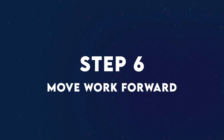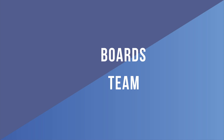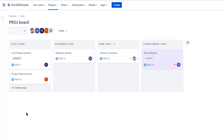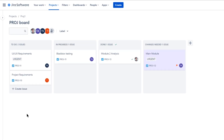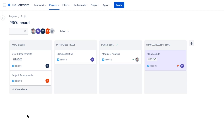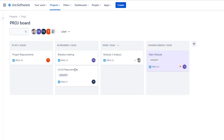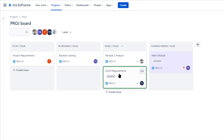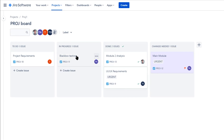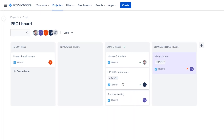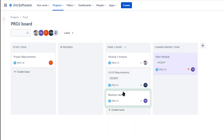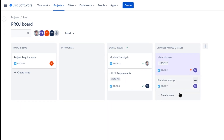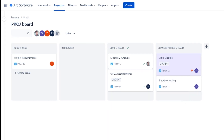Start moving your work forward. You have your boards built out, you have your team added, now it's time to get to work. If you're in a Kanban project, you can start tracking your work on a board. To track work items, you move an issue from one column to another as it progresses through your team's workflow. Jira has more integrations and the ability to see a bigger picture with roadmaps and reporting.